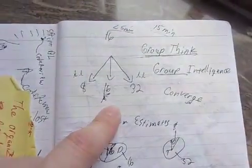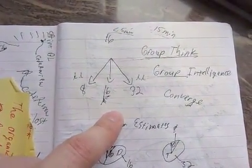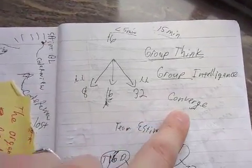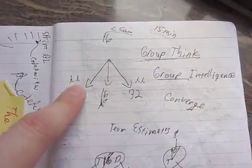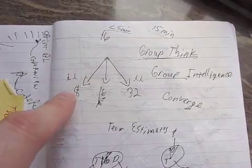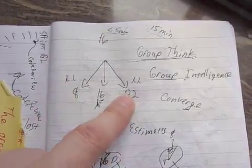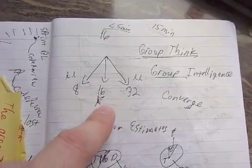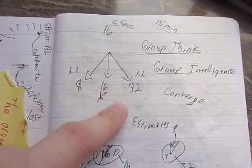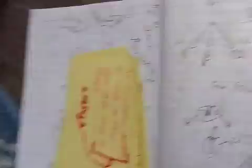Well, we figure out how to converge now to a one number. So you have the team. You ask the people on the low end, talk to the people on the high end in this meeting, and discuss for maybe two to five minutes about why it's an eight or why it's a 32. So each party discusses and discusses.